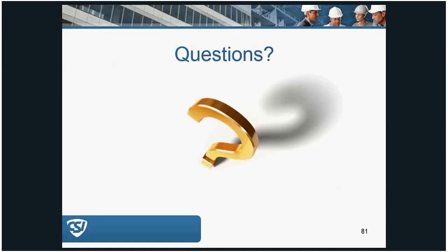Well, the best procedure is to make sure that in your Division 1 sections you have the substitution procedures in the form, and that you, as the construction administrator or the architect of record, insist on that process being followed. And you talk about it in the pre-construction meeting and make sure that everybody clearly understands what the game plan is for that.